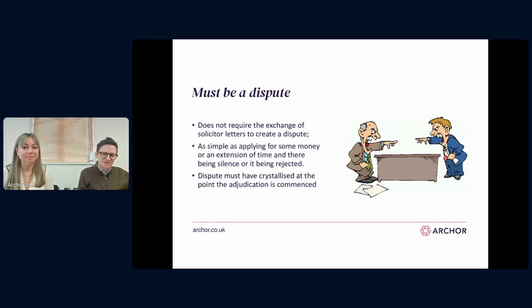So as Hannah mentioned, the Construction Act says that either party can refer a dispute, singular, to adjudication at any time. So that means you can only refer one dispute, and we'll come on to the difference between one or more disputes in a few slides' time. The key point for now is that the dispute must have crystallised by the time that you serve the notice.